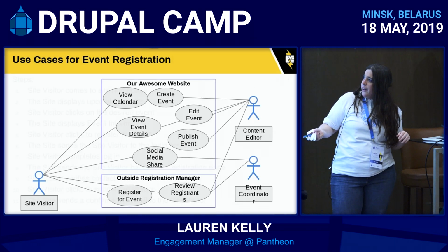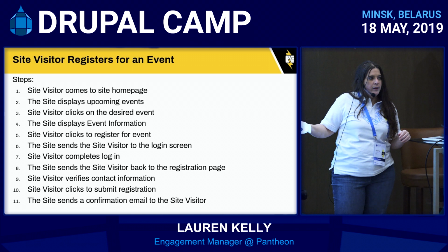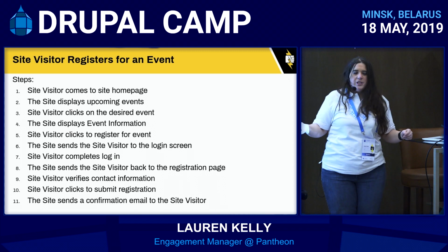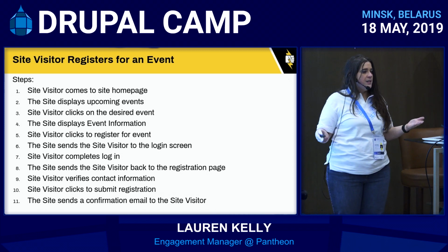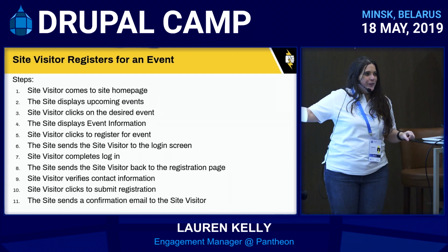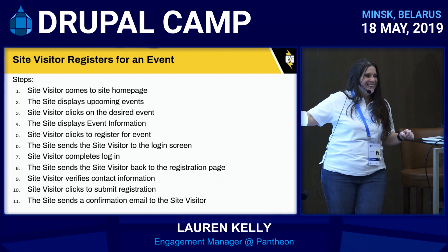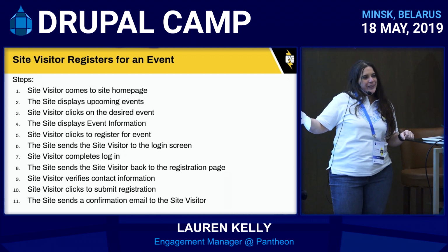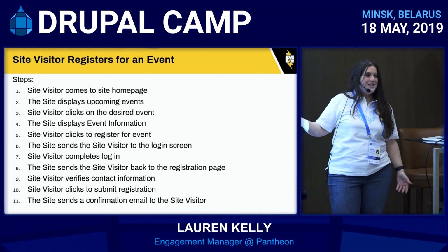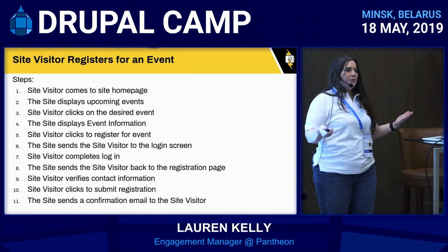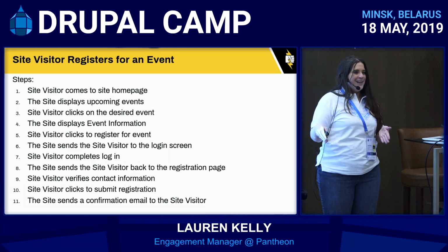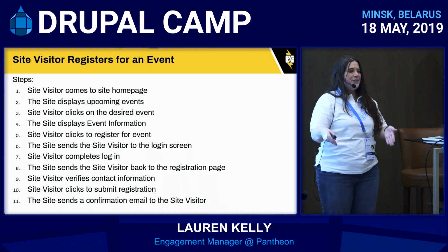We also now have, from here, an outline for QA. The QA team can go ahead and turn this into testing scripts, or if you're not using scripts or automated testing, you could give this to your QA team and they have a workflow to follow that the developers didn't provide. This is done before development. So if the developers have done all of their work, this will happen. But if they've missed something, and again, this is from experience of being on projects where the tests came after development, well, everything passed because the developers said, this is what should happen.